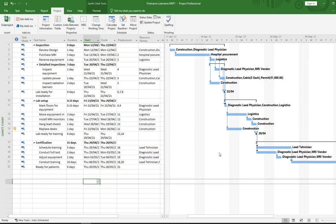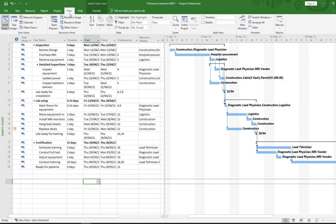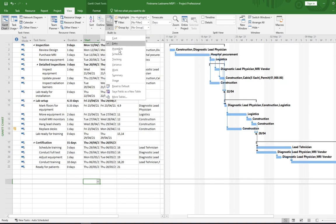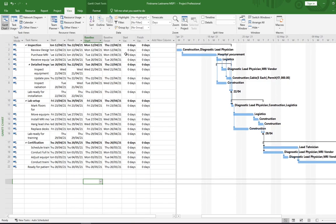The baseline saves values for things like start date, finish date, duration, work, and cost. You can see these values in tables within the project. One of those tables is the Variance table — click the View tab, then in the Data section click the Tables drop-down and select Variance. This table focuses on dates: you can see planned start and finish dates alongside start and finish variances, which show the differences between your baseline and what's happening now. All dates will be the same as your baseline initially, but will change as your project gets underway.